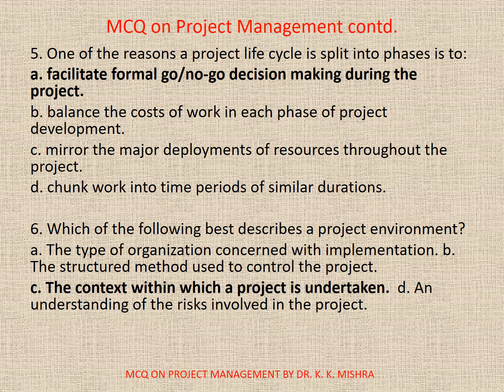Question 5: One of the reasons a project life cycle is split into phases is — Options are: A. Facilitate formal go or no-go decision making during the project; B. Balance the costs of work in each phase of the project development; C. Mirror the major deployments of resources throughout the project; D. Chunk work into time periods of similar durations. Correct option is A: Facilitate formal go or no-go decision making during the project. Question 6: Which of the following best describes a project environment? Options: A. The type of organization concerned with implementation; B. The structured method used to control the project; C. The context within which a project is undertaken; D. An understanding of the risks involved in the project. Correct option is C: The context within which a project is undertaken.